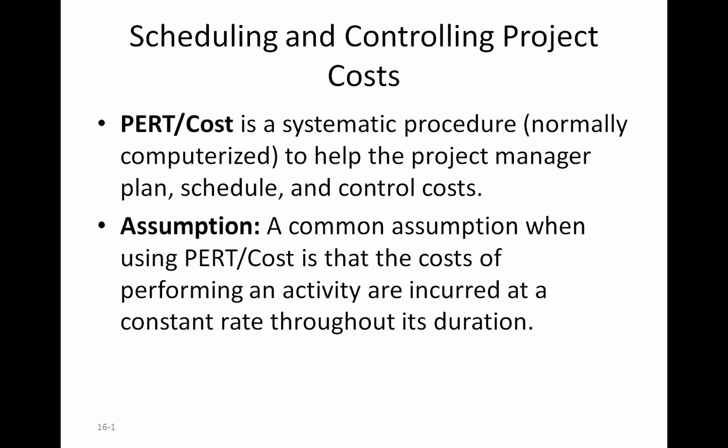So the critical activities are those that do not have any slack in them. In other words, if you don't want the project to go tardy, they have to start and finish when the earliest and latest times are the same, okay? But for the non-critical activities, you have some slack provided in them. So if you start an activity based on early start, when the activity is done, if you are subcontracting the work or you borrowed the money, the expenses have to be paid. No one works for free. So that means the payment also comes up early.